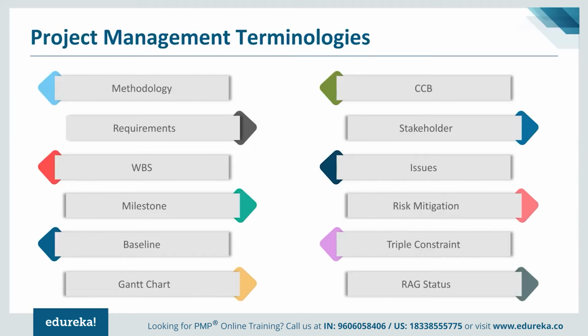So if there is any requirement, we just spoke about requirements. Your project team will spend a good amount of time talking to the stakeholders. They will use various techniques to gather requirements. And once all that is done, you will document your requirements, and the document is signed off. You take sign off from your customers. Now, if anything changes beyond that, then it has to go through a change control process, which is already defined. So what is baseline?